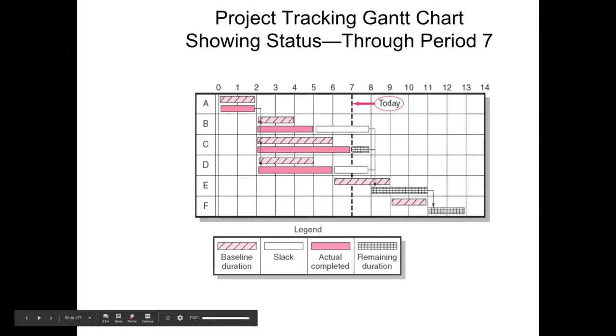So Paul, you mentioned it's 1 month over and overran expectations, which is correct. So it looks like activity C is about 90% complete, and we will still need one more month or week, whichever unit we are using, to see it finished. So this is a little bit of a concern. Activity D, you can see that this activity has taken 1 month more than what it was supposed to have taken.